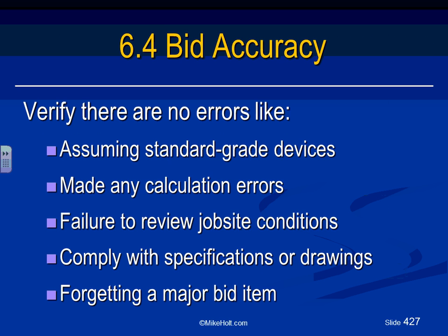Then bid accuracy. We're going to move into your bid accuracy. A couple of questions, Zach, you have to ask yourself about bid accuracy. Are we using standard grade devices or spec devices? The difference between them is very expensive. Twice the difference between a standard grade versus a spec type devices.